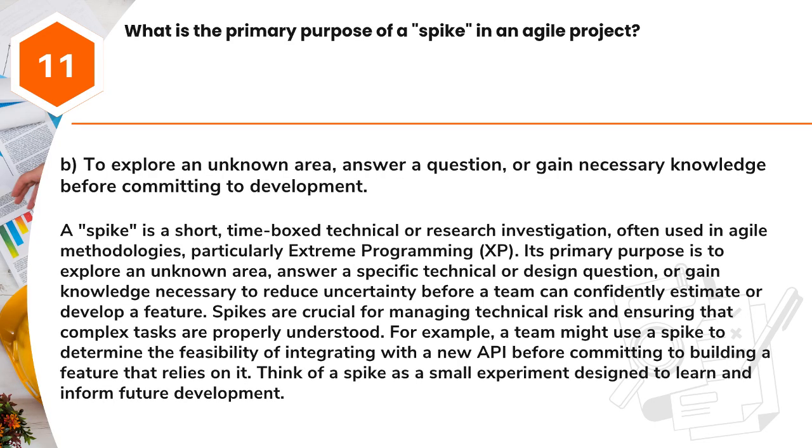Answer: B. To explore an unknown area, answer a question, or gain necessary knowledge before committing to development. A spike is a short, time-boxed technical or research investigation, often used in agile methodologies, particularly Extreme Programming, XP. Its primary purpose is to explore an unknown area, answer a specific technical or design question, or gain knowledge necessary to reduce uncertainty before a team can confidently estimate or develop a feature.